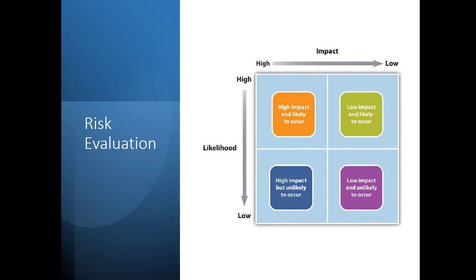There is a positive correlation, both increase or decrease together, between project risk and project complexity. A project with new and emerging technology will have a high complexity rating and a correspondingly high risk. The project management team will assign the appropriate resources to the technology managers to ensure the accomplishment of project goals. The more complex the technology, the more resources the technology manager typically needs to meet the project goals, and each of those resources could face unexpected problems.